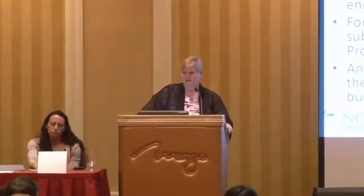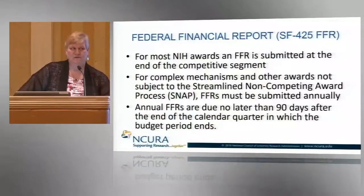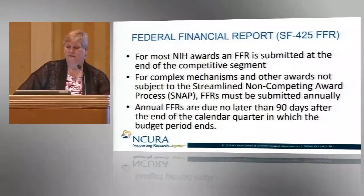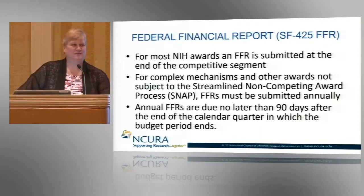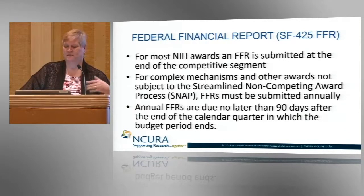So we're done with that? The Federal Financial Report, the SF 425 FFR. For most NIH awards, an FFR is submitted at the end of the competitive segment. We talked about they have 120 days after the end. For complex mechanisms or other awards not subject to the streamlined non-competing award process, or SNAP, the FFRs must be submitted annually. So clinical trials, cooperative agreements, program project grants, those are the ones that the FFR is going to be submitted on an annual basis.